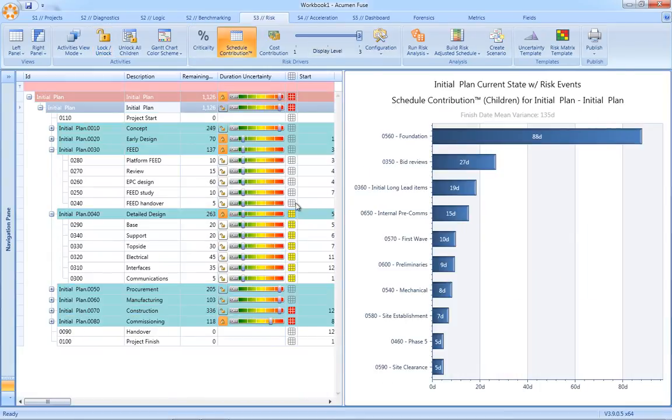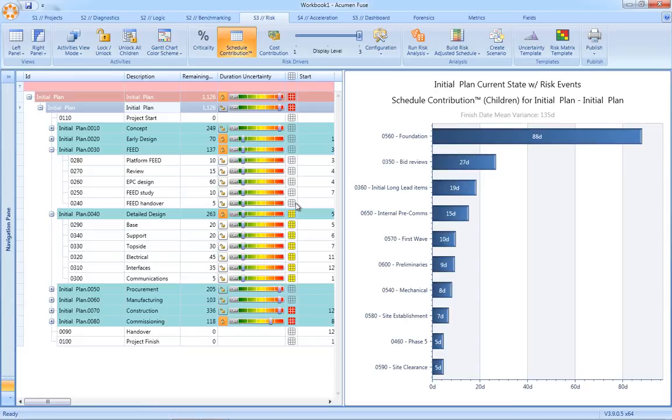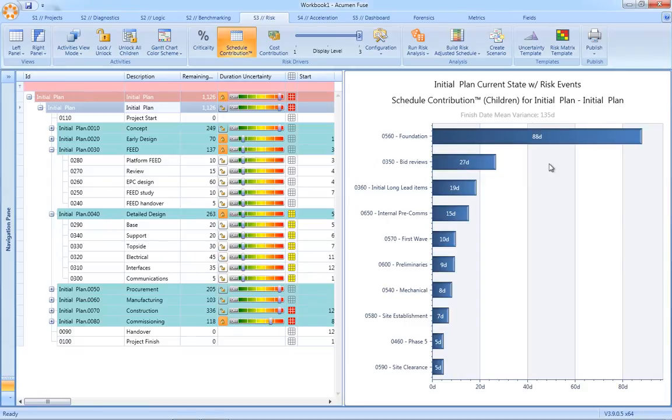The tornado chart is used to report both risk hotspots and key risk drivers within our schedule. Instead of using abstract percentage-based metrics to report risk drivers, Acumen Risk uses the unique schedule contribution factor. The schedule contribution factor not only tells us which activities are most responsible for our risk exposure, but secondly, it details these drivers in true duration and cost terms.